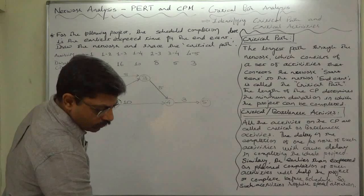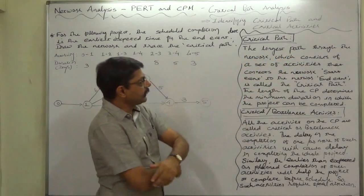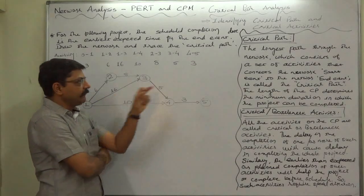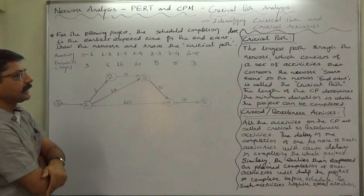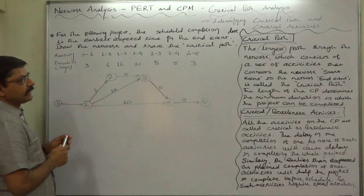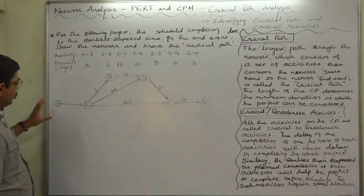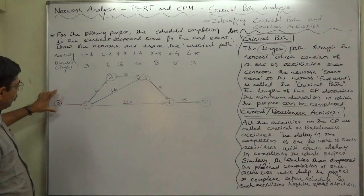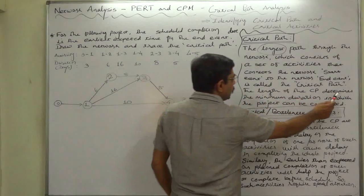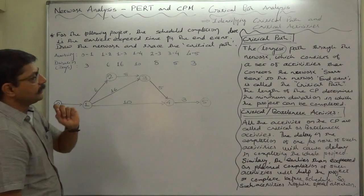Now the new point — the first is critical path. What is critical path? The longest path through the network, which consists of a set of activities that connects the network start event to the network end event, is called the critical path. The longest path covering various activities from start to finish of the project determines the minimum duration in which the project can be completed.